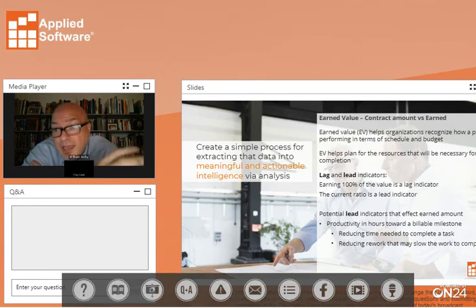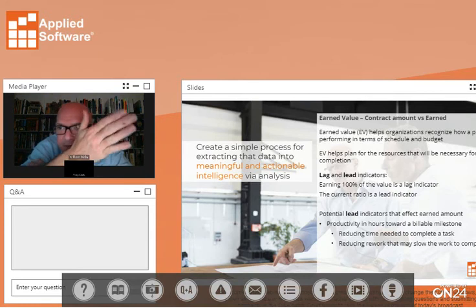Typically we show, hey, here's what the end result should look like. Okay, great. But if you're leaving it up to that user to decide the path to go and when to get there, just in general, hey, we got to get this project done in 2 months. Okay. Well, they may be productive for those 2 months and then at the end say, oh, we need more time to do this thing. But if I've built these kind of smaller packages of, hey, we have to do this process and it should take this long, and here's the process to do it, I've got a little more control over it, right? But it takes time to set that up.